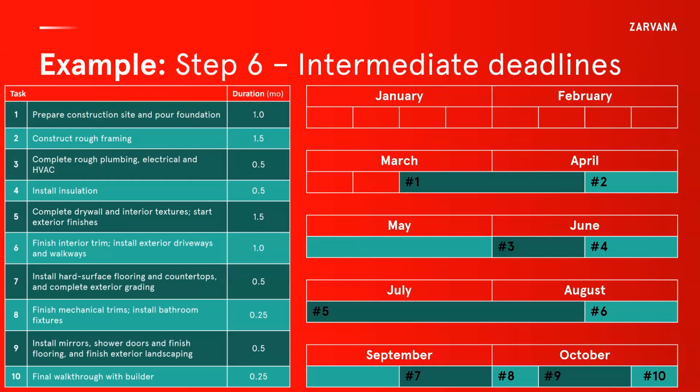And so here, this actually provides super valuable information for you, because think about it. If somebody were to come up to you and say, when are you going to complete the drywall for this project, which is step 5, without having done this exercise, you would have very little idea of when exactly that needs to start and when the deadline is for that. And so this provides a nice, simple visualization of when work needs to be started and when it needs to be done.